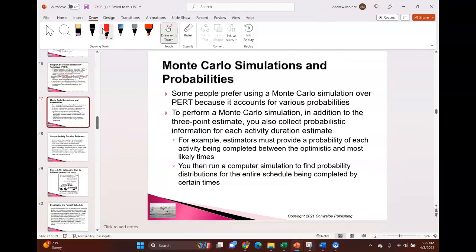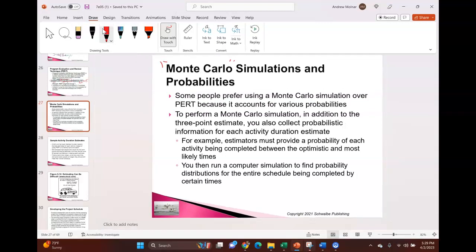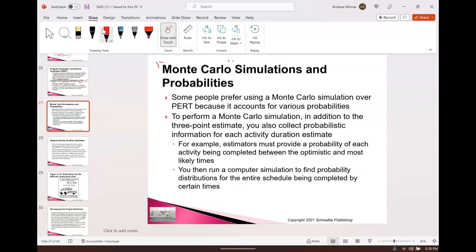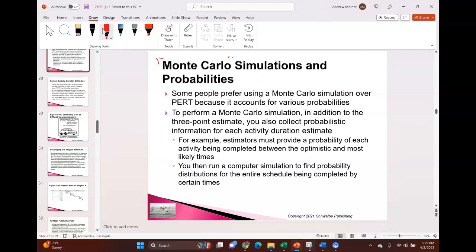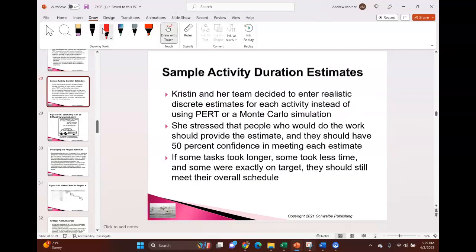You could also use Monte Carlo simulations — named like the gambling destination in southern France. Basically, you take your whole schedule and all your constraints and plug them into a simulator. It outputs data like when your project will likely end and where your critical path falls. It's a fabulous tool, but very expensive and rarely used — unless you're running a billion-dollar mega project, as PMI calls it.